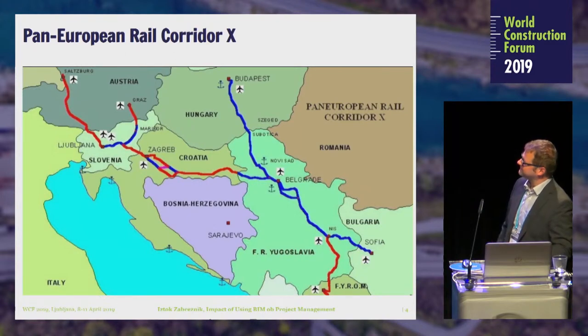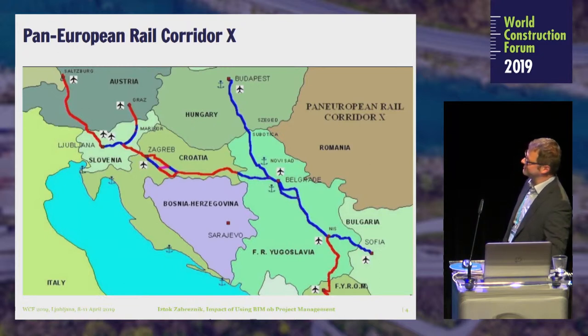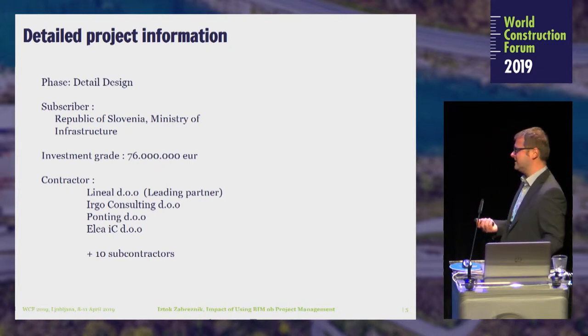Saying a few words about the project. This corridor is part of the Pan-European Corridor 10. Our part is a little small part, one part of the railway which is not two-track yet. So it's a small part but really important for Slovenia. The phase of the project was detailed design, the subscriber was the Ministry for Infrastructure of the Republic of Slovenia. Investment grade at the beginning was 76 million, now it's about 100. Contractors, there were four: we, Linal, Irgo, Ponting and Delea. Linal is the leading partner and there were more than 10 subcontractors, which means approximately 18 companies worked on that project.